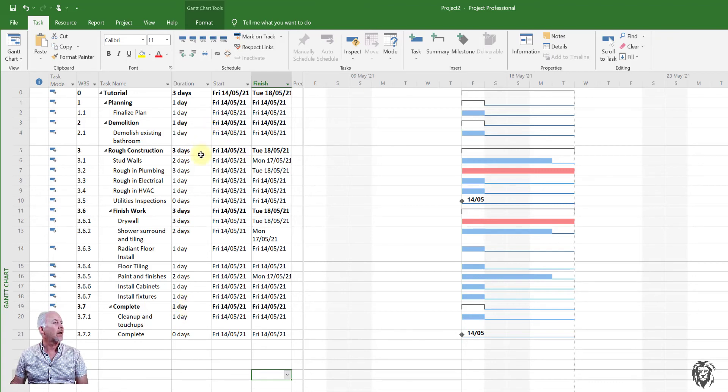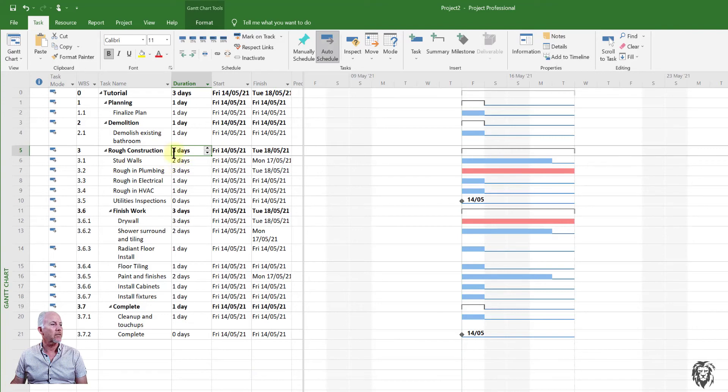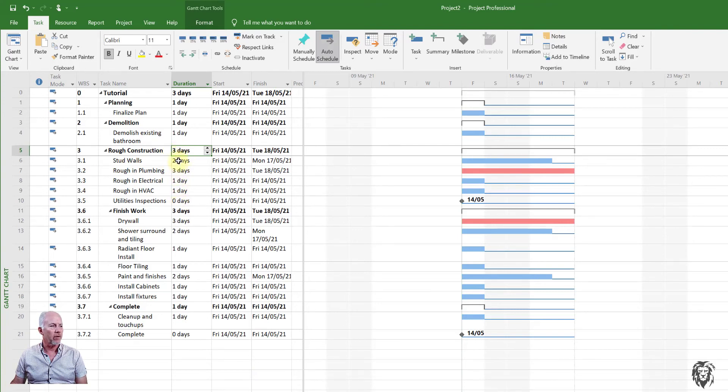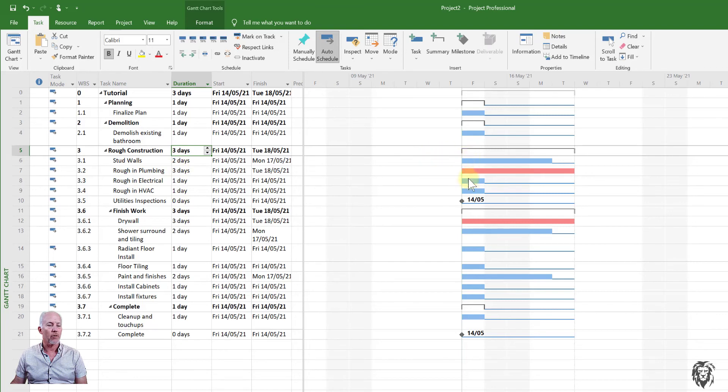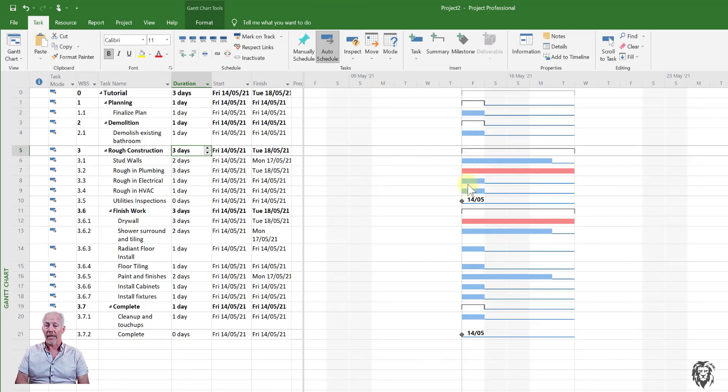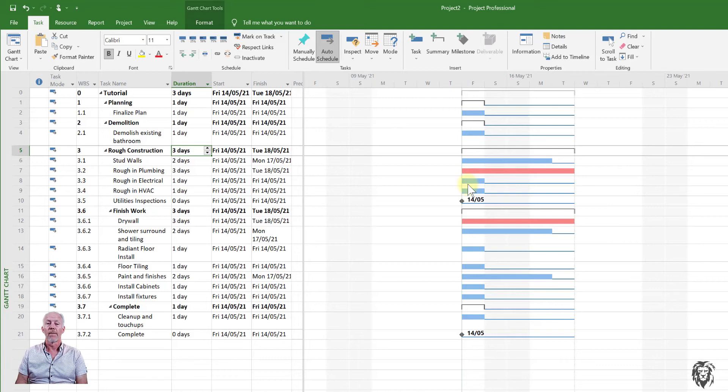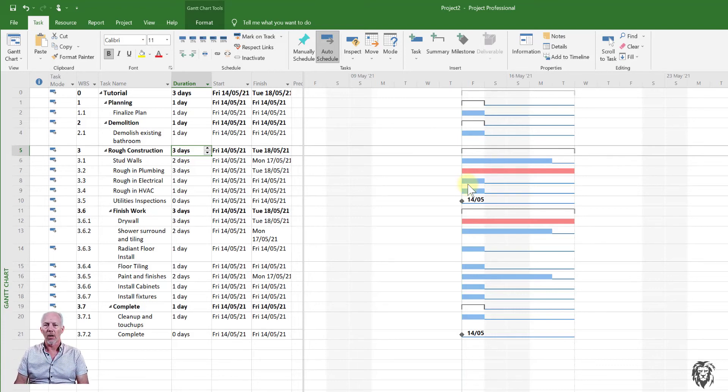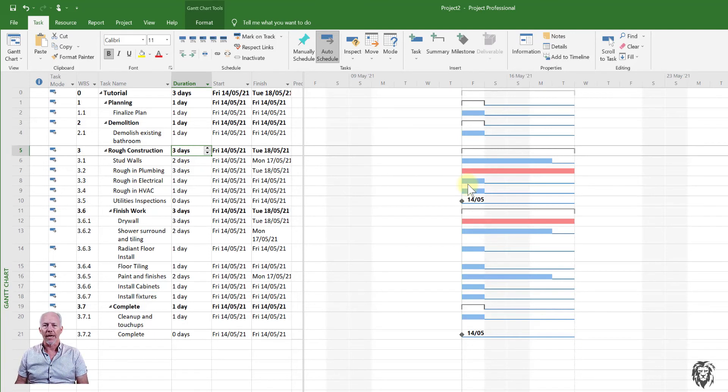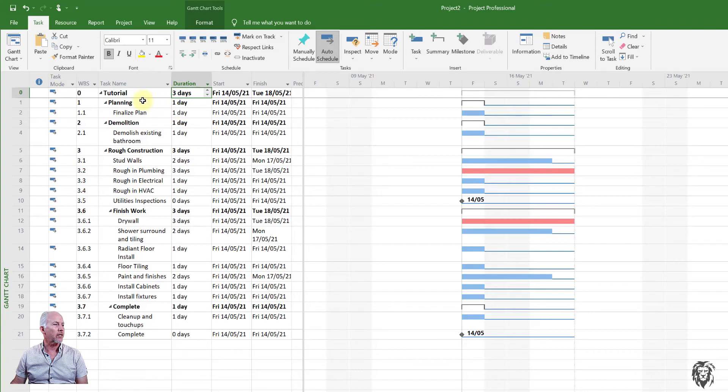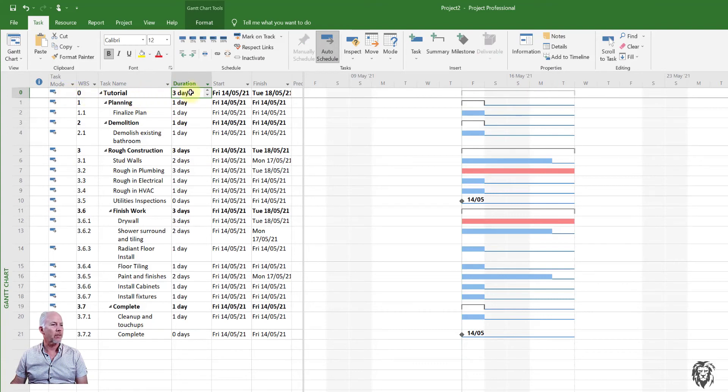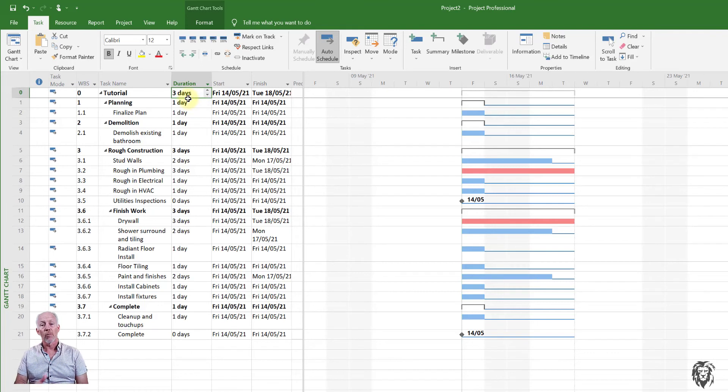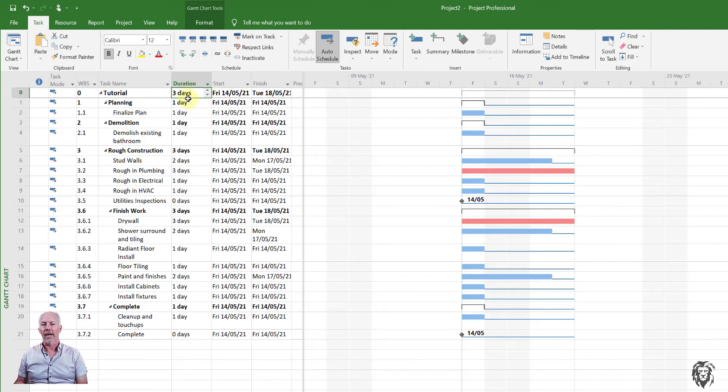So complete includes these two tasks and the total sum of the days going in here is one day. Now, if we look up here, rough construction, it has this total sum of three days, but that's not really the sum of all of these tasks. So that's because according to the schedule right now, they're happening at the same time, they're happening in parallel. And so what the three days is, is the longest path to get all of those tasks done. And it rolls that up here. And so we see that our project duration in that summary task up at the top, which we have turned on is also three days. Now, once we give order and precedence to these tasks, that's all going to change.